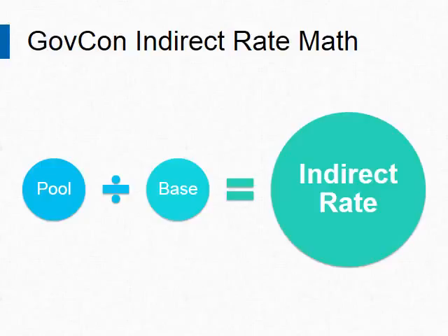Don't do that. You'll also be told that, oh, don't send me an invoice for every fiscal year. Again, we can just wait till the end of the contract because, I don't know, year one you might overrun, year two you might underrun. Those will offset. Everybody will be fine. That's not true. Money could go away. Other changes could happen. You need to make sure you're getting even every year and settling it up separately and promptly. Once you know what your rates are after the close of the fiscal year, you should go ahead and bill for those differences. You want to get the differences in the pipeline.